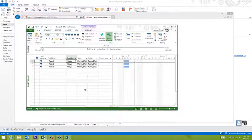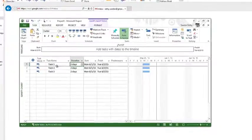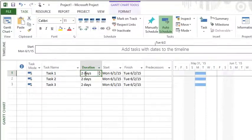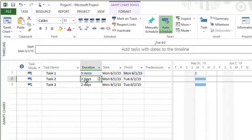Continuing our series of videos on Project, let's talk about durations. When you're entering durations, start with the lowest unit. So if I type in 5m, that is going to do five minutes. Our lowest unit is going to be minutes.